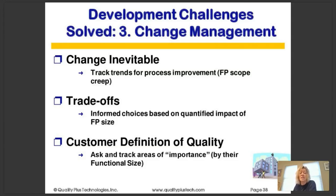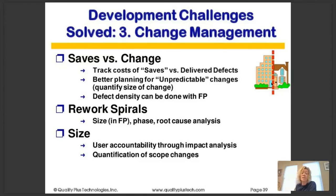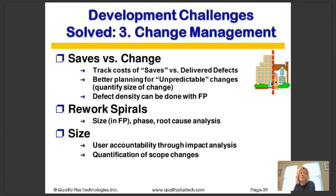There are many scope management techniques based on unit costs and function points. We can look at the customer definition of quality, portions of scope in terms of functional size, saves versus changes, and track the costs of saves — defects detected before delivery versus the size of delivered defects. We can take a look at defect density in terms of defects per function point, rework spirals, user accountability through impact analysis, and quantify our scope changes.